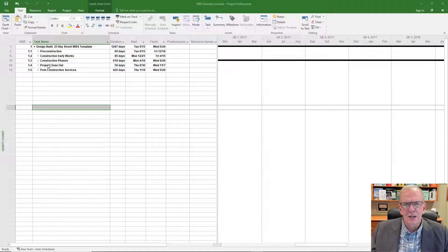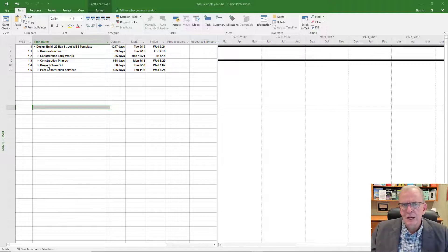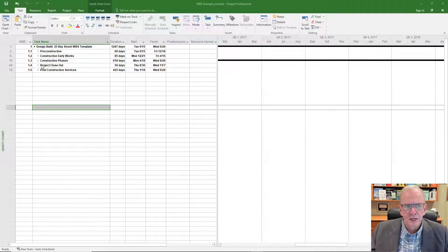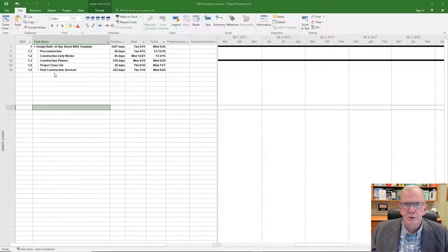What you try to do is standardize it within your business or the types of projects you do, because you can even make a template out of this so that you have these headings already predefined. Then you're really just filling it in. The next one is project closeout — all the things you have to put together to close out the project — and then post-construction services: warranty items, service agreements, or anything else you're performing as part of the overall contract.